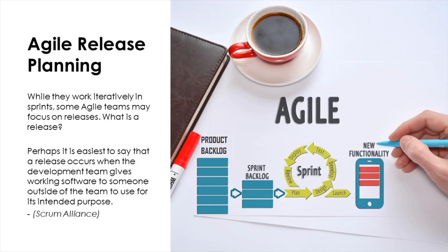And in each sprint, you take a few slabs of that product backlog, you put them into development, you complete the sprint, and then you go back and you get more, and that is how sprints work in the world of Agile. So the bottom line is in Agile release planning, you are thinking of a roadmap for how to release different functionality across to the customer.